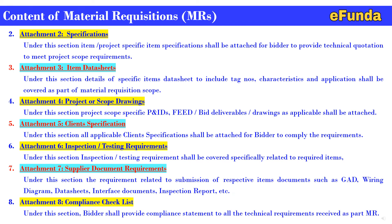Attachment 8 is the compliance checklist. Under this section, the bidder shall provide a compliance statement to all the technical and particular requirements of the authorized material requisition, so that all sections are maintained technically correct and all requirements are listed. This ensures one will not miss the actual or minimum requirements of any item while purchasing or as part of the procurement engineering cycle.